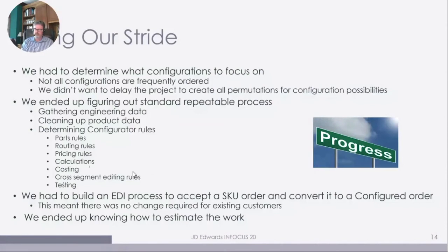When we went to Medeco, they have a catalog that has, like I said, probably 50 different product lines. Before we went live, we were working on the most popular product lines and left the lower volume product lines towards the end, which actually spilled over into after go live. There were some product lines we're still doing as SKUs. Most of the stuff was coming through as configurator, and over time they worked out the last bit of them.